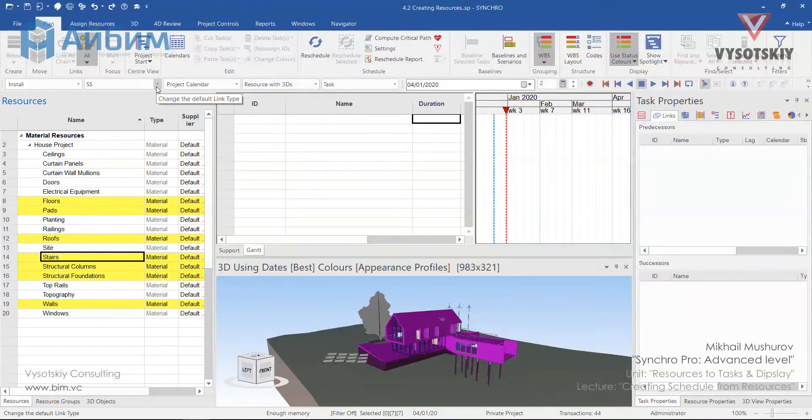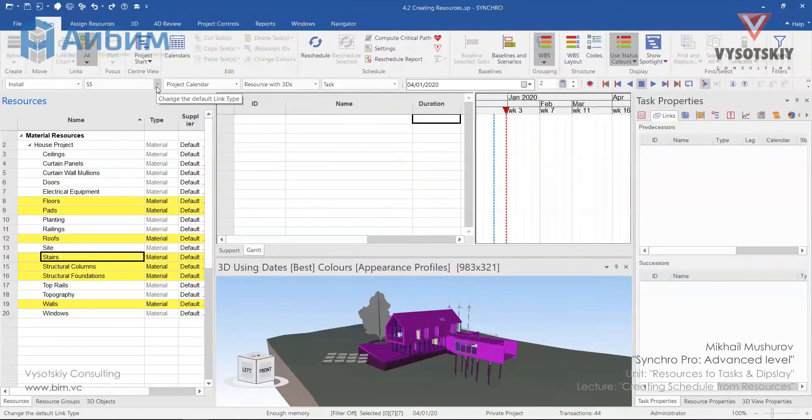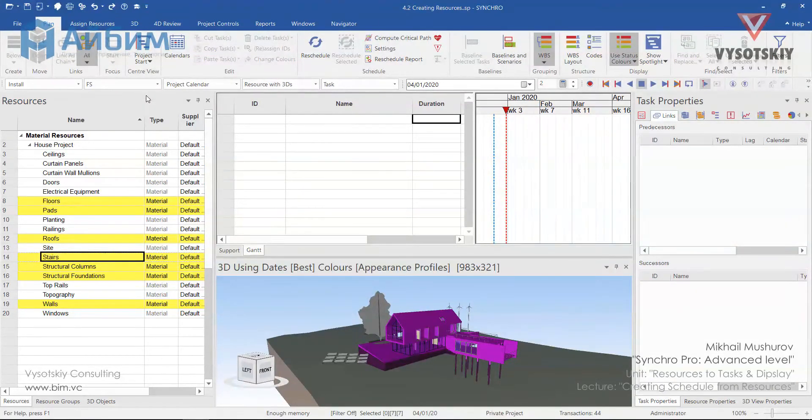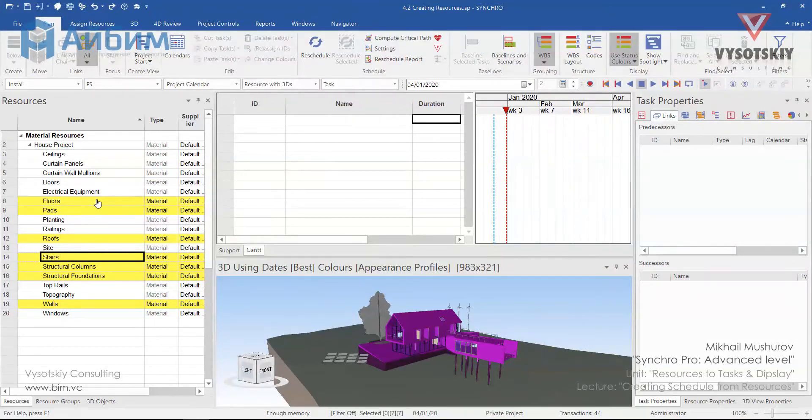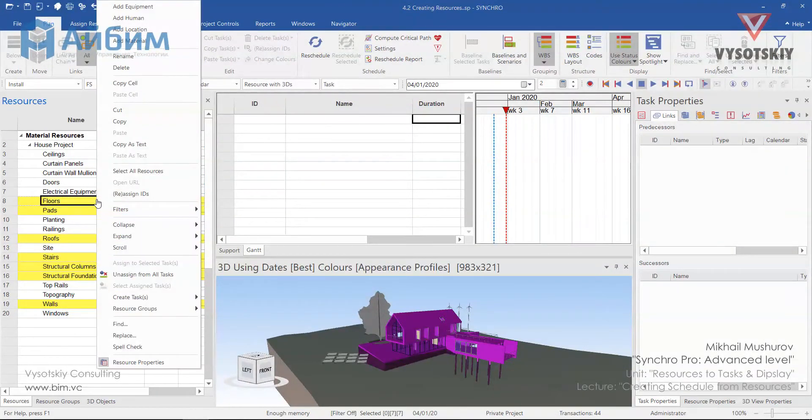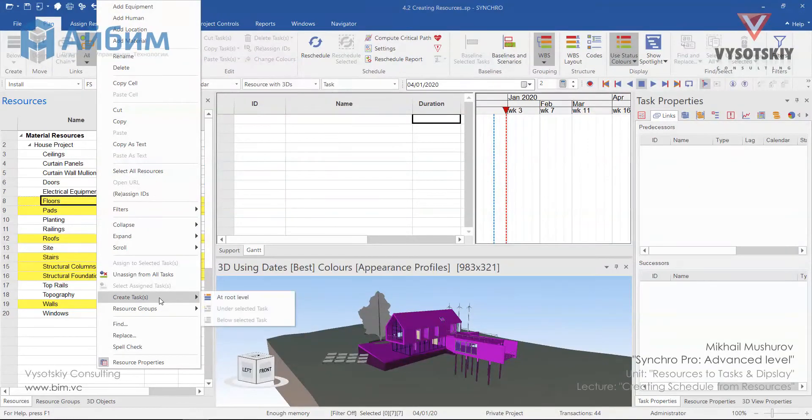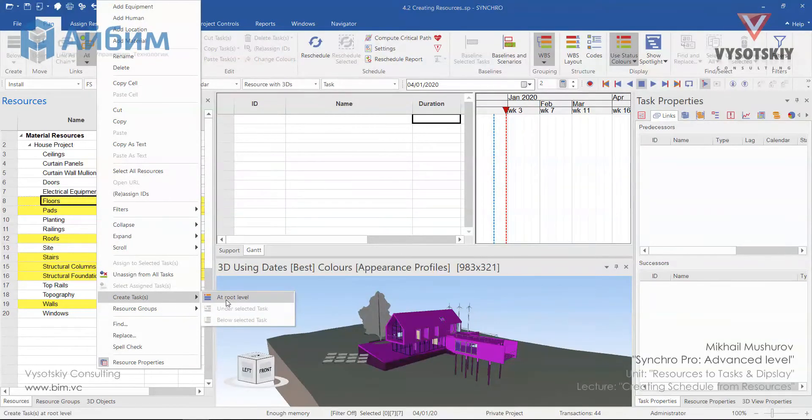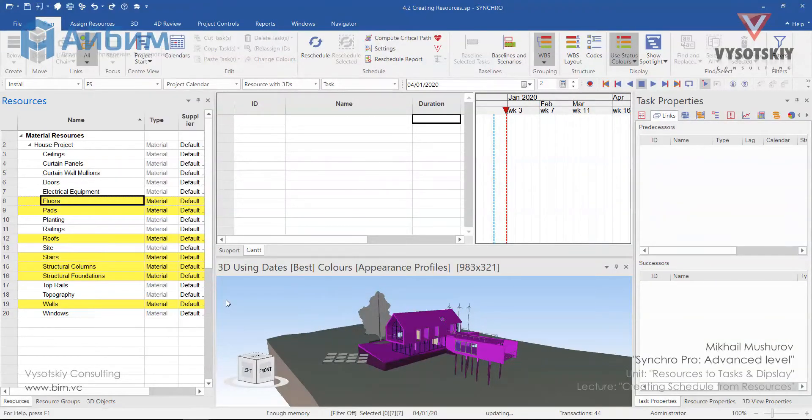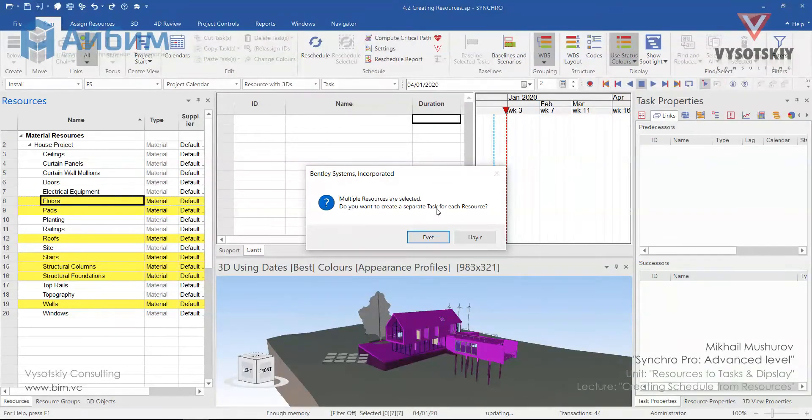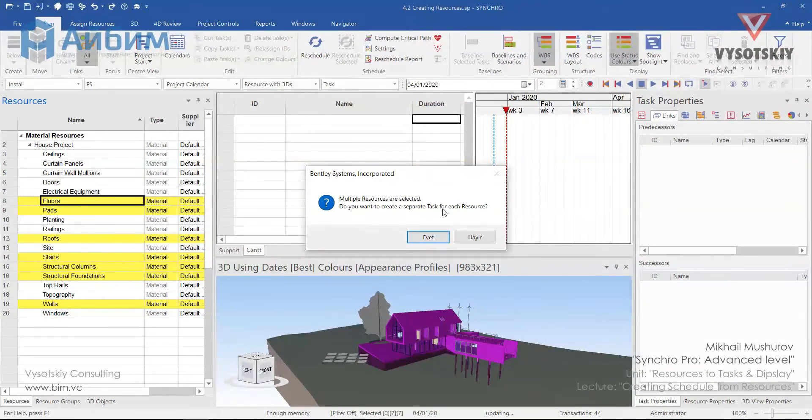Now, we need to change the link type between tasks from start to start to finish to start. Make a right click over highlighted resource and select create tasks at the root level. Click yes. We give our consent that we would like to separate our tasks per each resource.